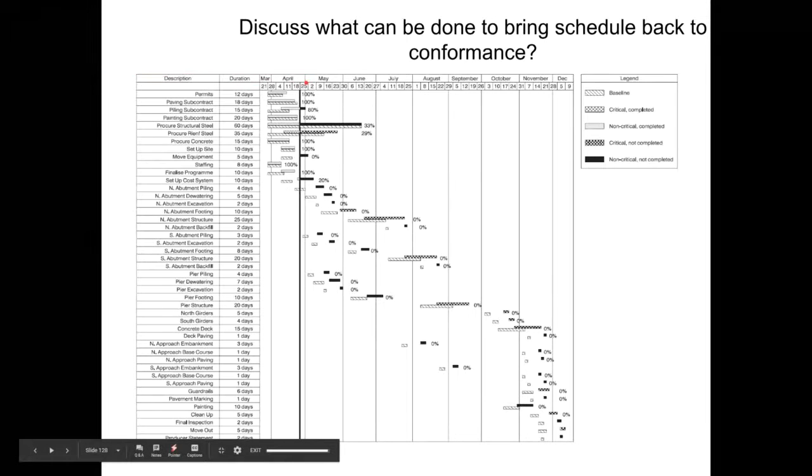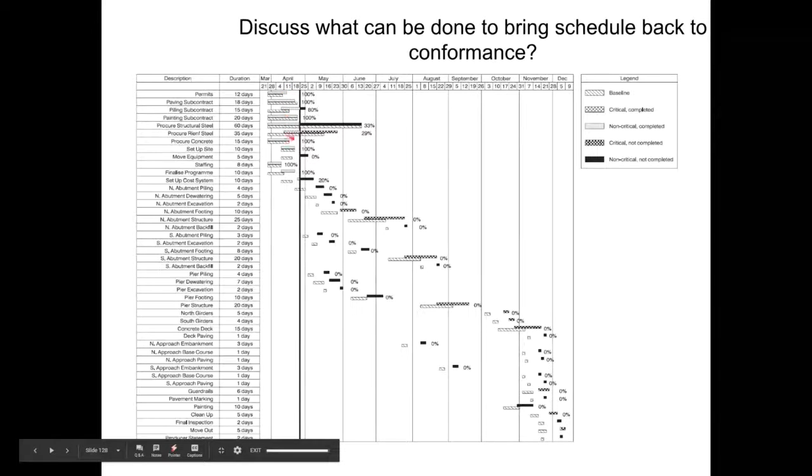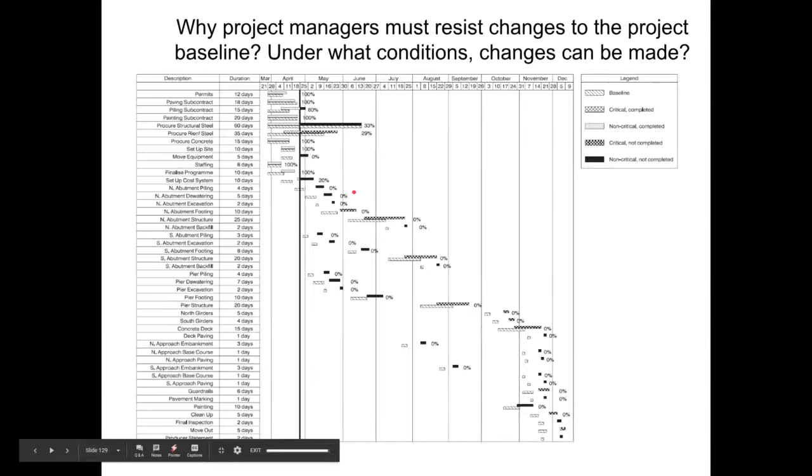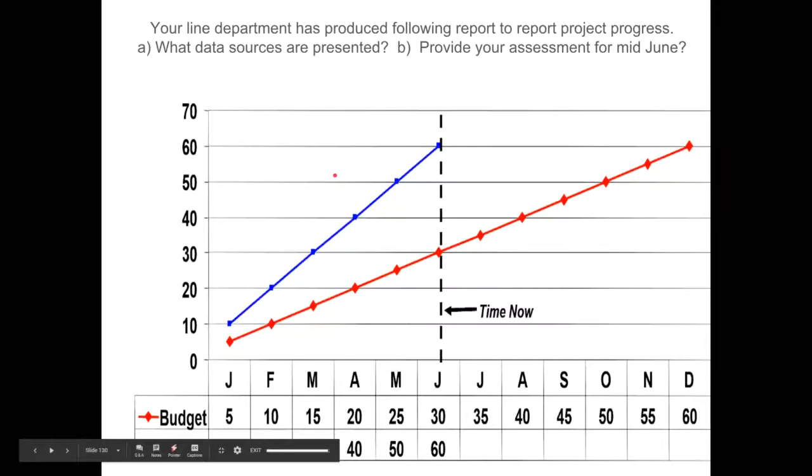So the key principle is that at the point of reporting, you look at the activities on the left of the line which you are reviewing, and you identify which activities are having a delay, and also you will be looking at finish to start relationships, so which of the subsequent activities would suffer. This is about the baseline and the tracking Gantt charts. If you are using any software, maybe Primavera or Microsoft Project, you could explore how you would do baseline and tracking Gantt charts in the software that you are using.